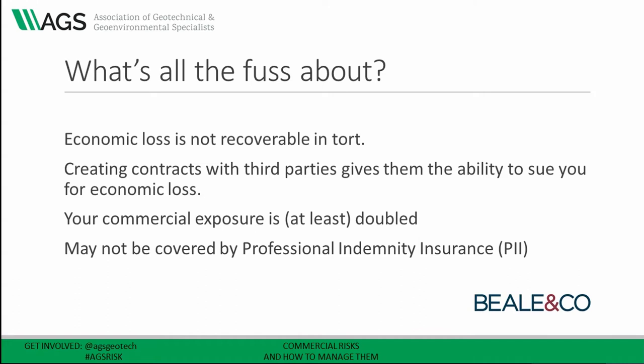Letters of reliance and assignment of reports tend to be less formal, and the usual limitations of liability are likely to be forgotten, which can expose you to even greater risks. Your insurers will look carefully at these contracts and whether the types and extent of the losses you are now exposed to are covered by your professional indemnity insurance.